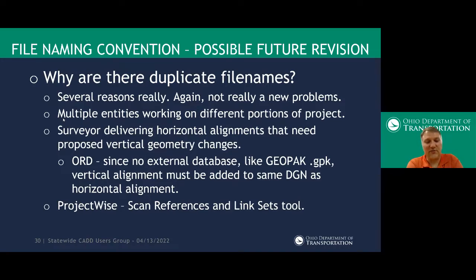It just saved it in the GPK file. So at some point, someone needs to take sort of ownership of that. And what we found is the surveyors are delivering a BK001 file, and then that's getting copied over into the engineering folder. And now there's 2 files with the exact same name. In some cases, 2 or 3, 4 in different folders in a project.